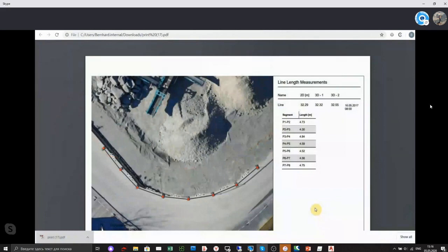And the last example of metrics is geometry analysis, to measure length. Also, this can be 2D or 3D lengths that you can measure. Here's an example of a fence. You want to put into your invoice the length of the fence, you measure it out directly here.